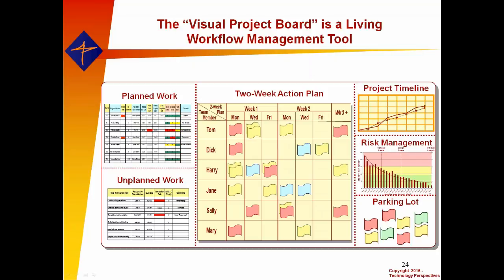And I always have a parking lot for unresolved issues. If we don't know what to do with it, I never lose anything. So if something comes up in the meeting, not sure where to put it, we stick it on a Post-it, put it in the parking lot, and we'll disposition it at the next meeting.